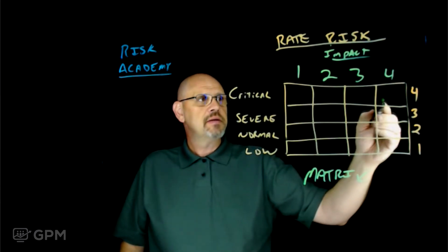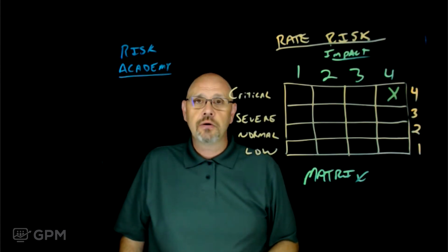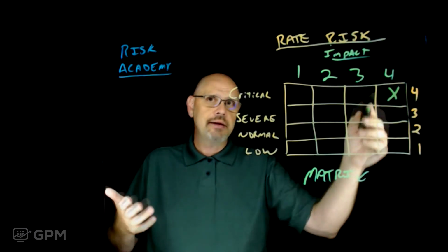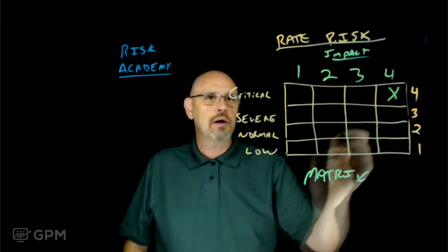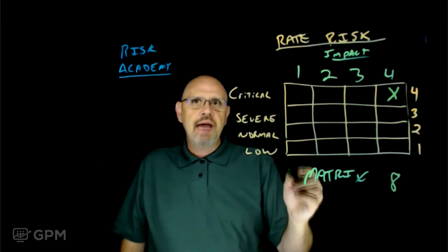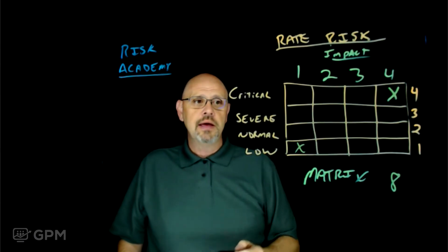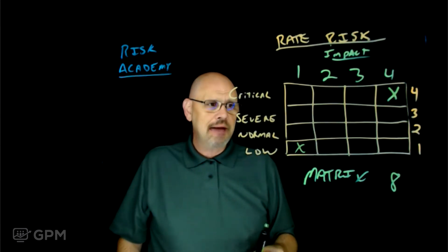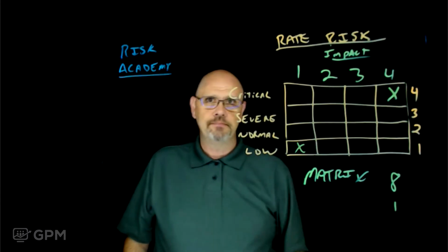So if you had something that's critical and very high impact to your organization, and if it's gone, maybe you're multiplying or adding them together, I will say adding them together. Maybe that one gives you an 8. Where if your public website is unavailable, it's low to your organization and doesn't have a very big impact. All right? Then that may be a 1.